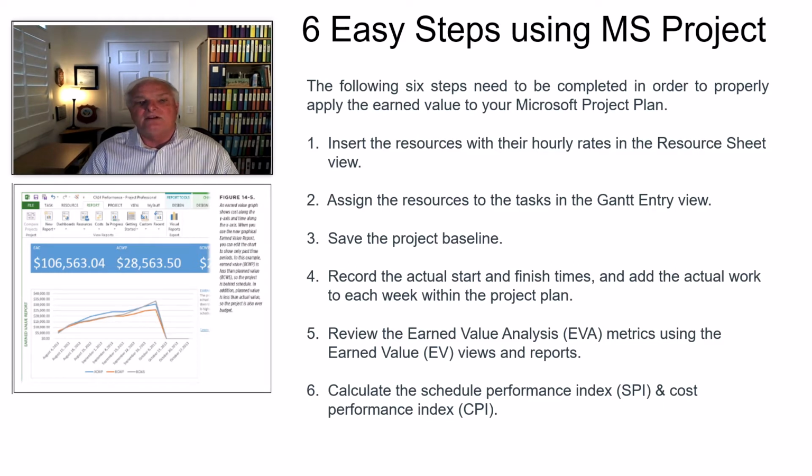Okay? You assign the resources to the tasks in the Gantt entry view. So you assign them to all of those predetermined tasks that you have, and that way you know how much it will cost for each one of those tasks. A summation of the hours that you anticipated times the labor is going to give you what each one of those steps should cost. And then that's what you save as what we refer to as the project baseline. That gives you the baseline.